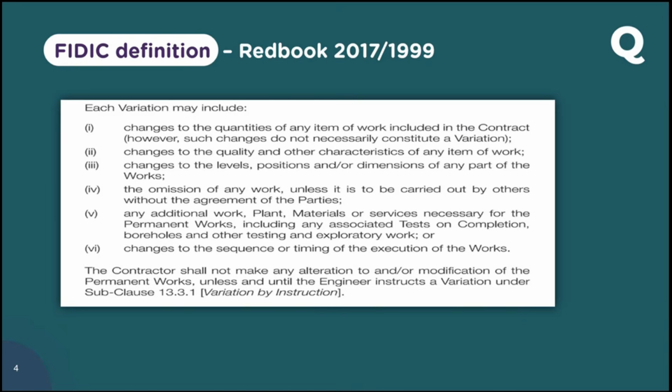So what you should do, again, you have to send a notification to the client. As per the baseline or our proposal, the sequence was we plan block A, we complete block A, then go to block B. But now you're telling us to go together on block A and block B, which literally needs extra resources and equipment, which constitutes more cost for us. You are to pay for it. This is an example of a change in sequence or timing of the work.